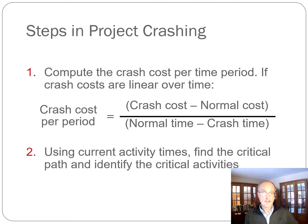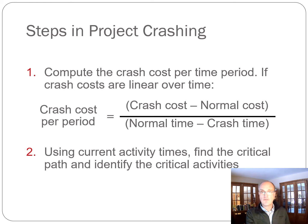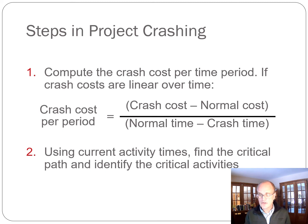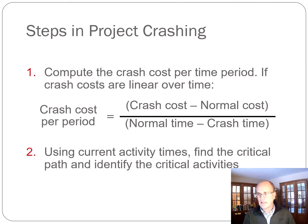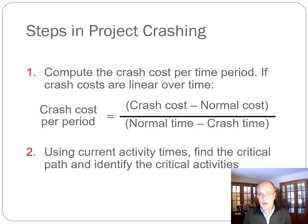If we shorten the time it takes the 45-minute driver to get to Toronto by 15 minutes so they arrive in 30, then all of a sudden I become the critical path because I still take 35 minutes. That demonstrates two concepts: first, shortening my time originally does nothing for the meeting time because the other person takes longer; and second, if you shorten the other person by 15 minutes without considering my time, you still won't meet the 30-minute timeline because another path becomes critical.